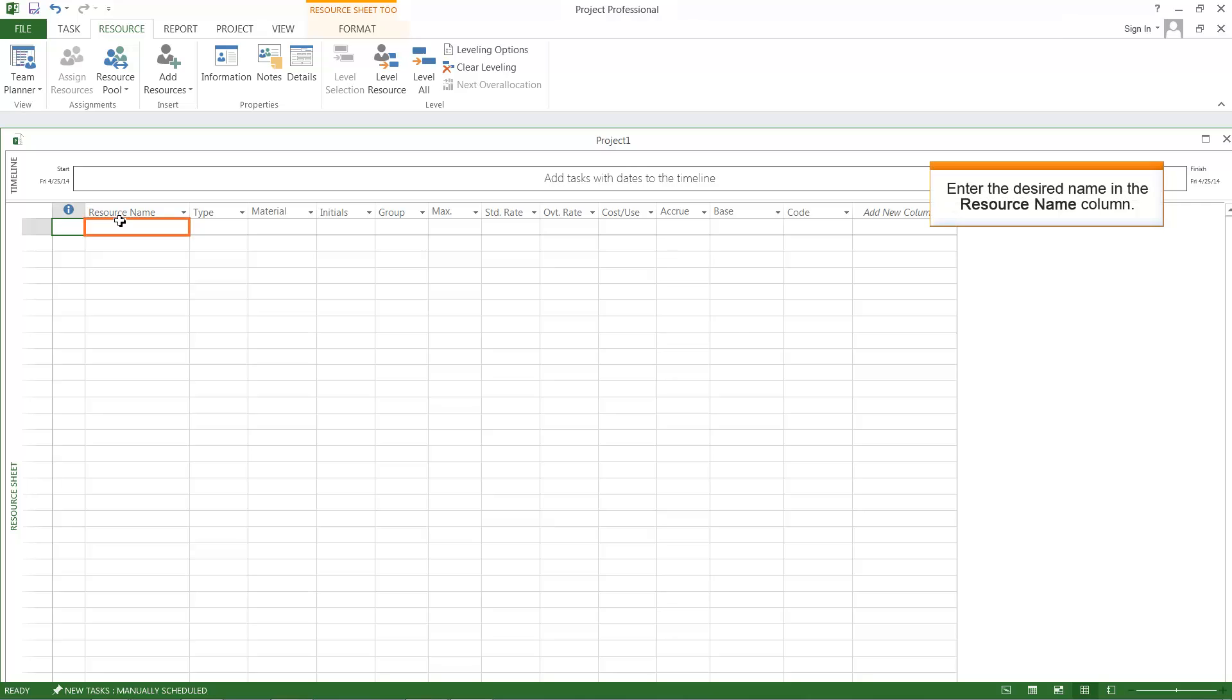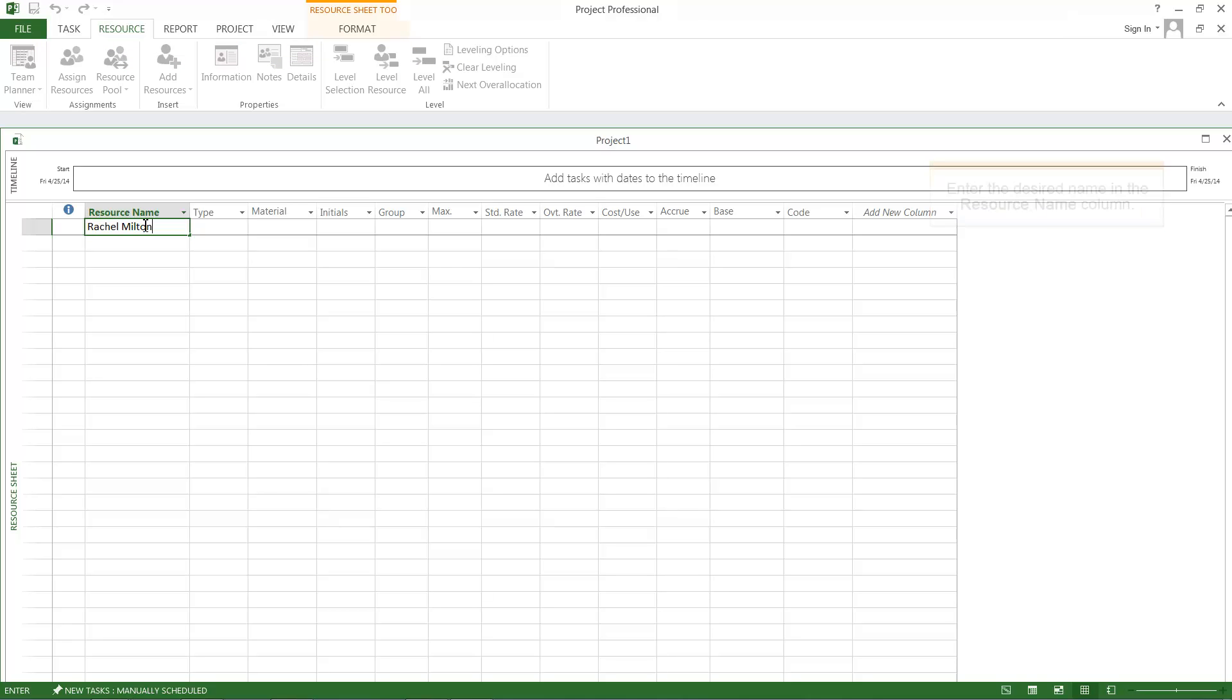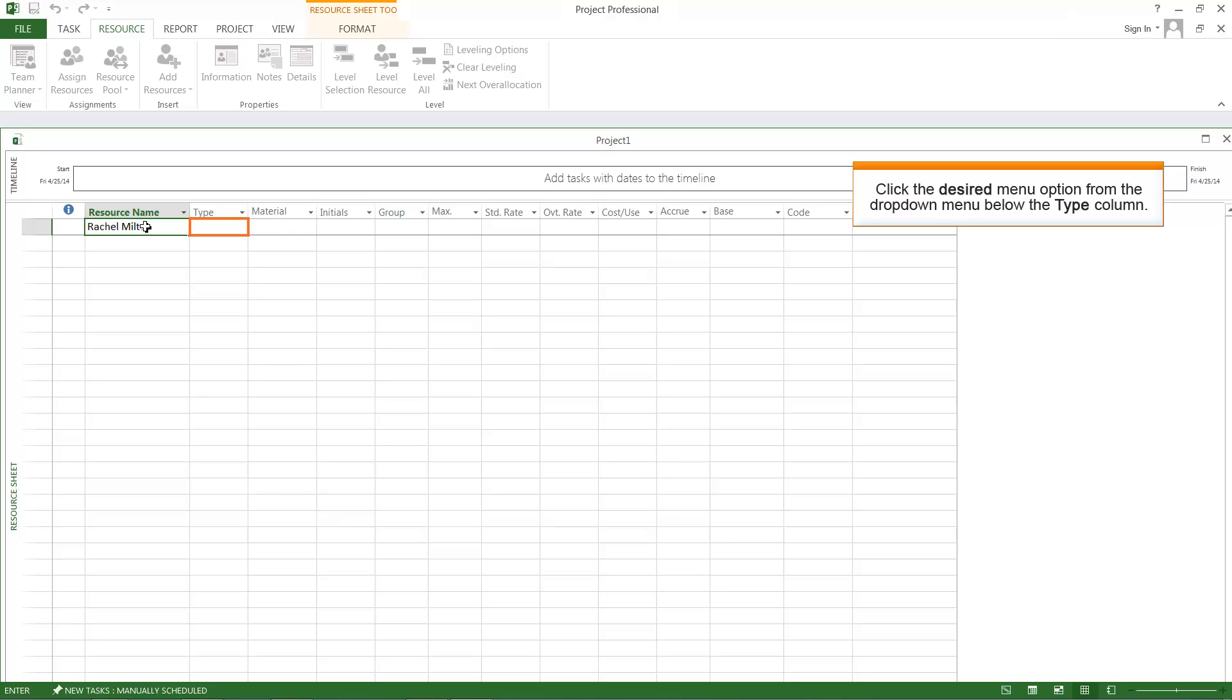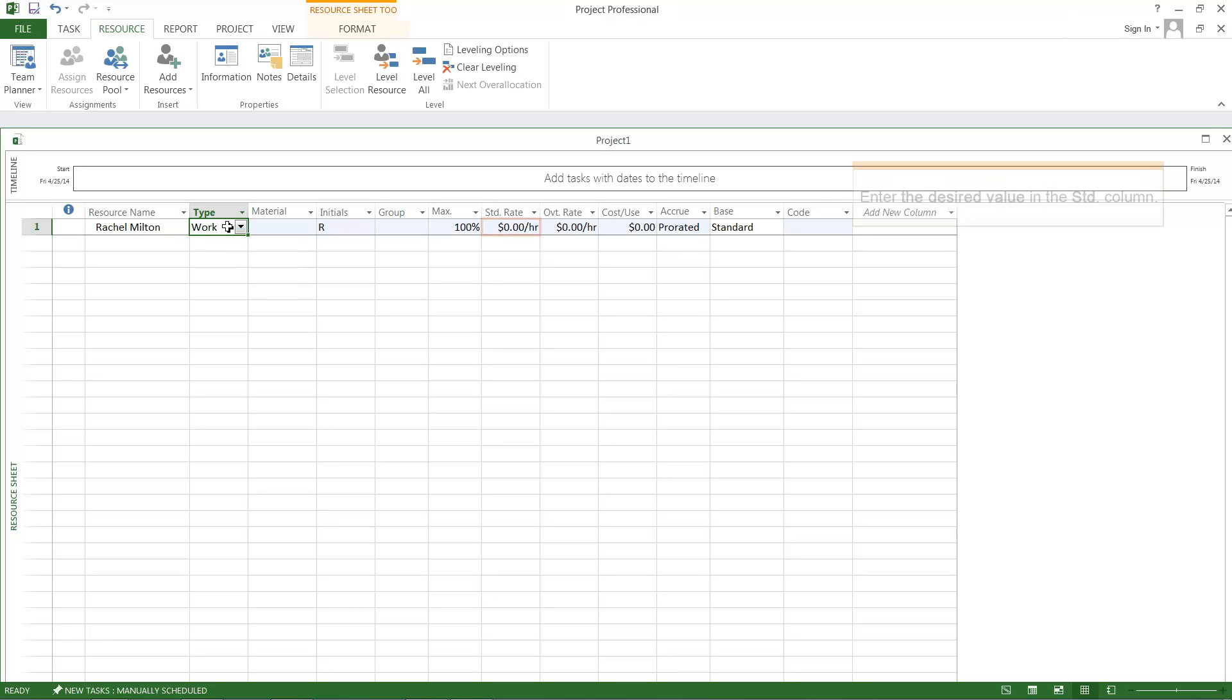Enter Rachel Milton in the empty cell under the Resource Name column. Click the Work menu option from the drop-down menu below the Type column. Enter 100 in the STD column. STD represents standard rate in the Resource Sheet.